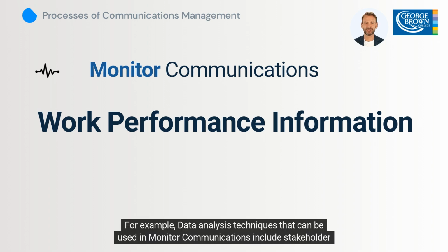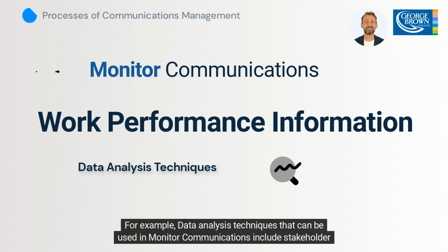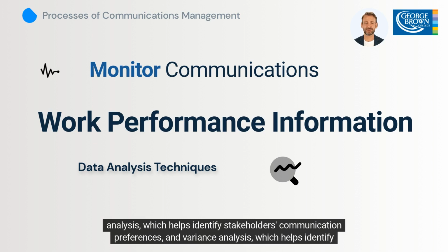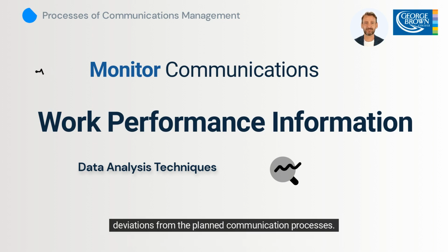For example, data analysis techniques that can be used in monitor communications include stakeholder analysis, which helps identify stakeholders' communication preferences, and variance analysis, which helps identify deviations from the planned communication processes.